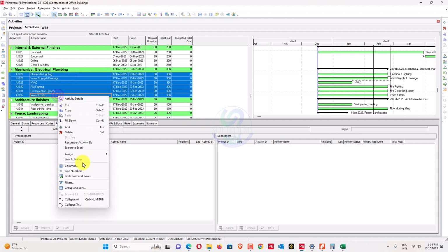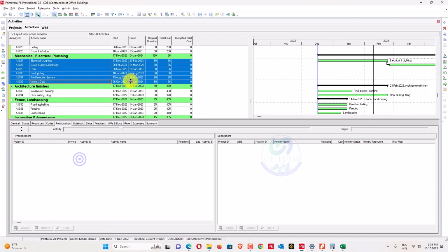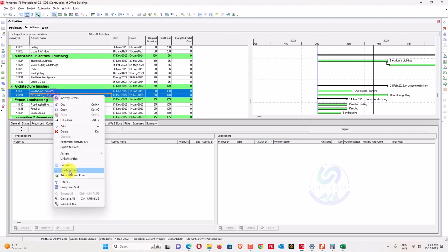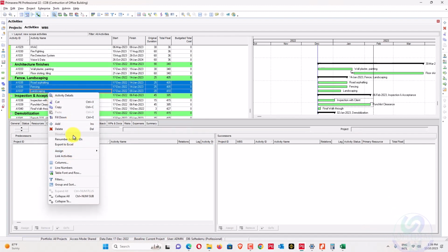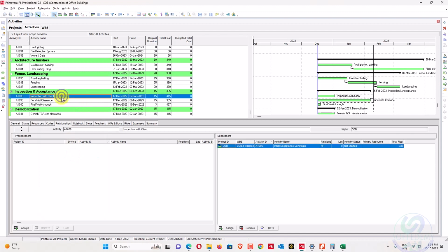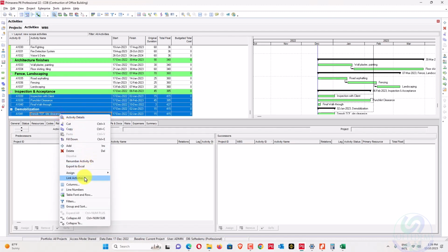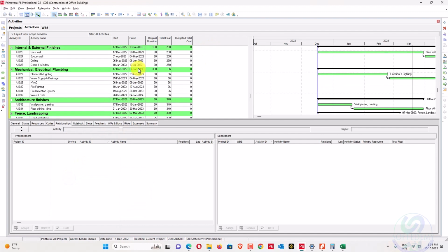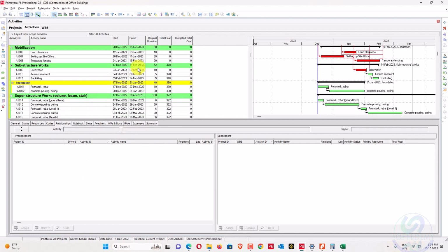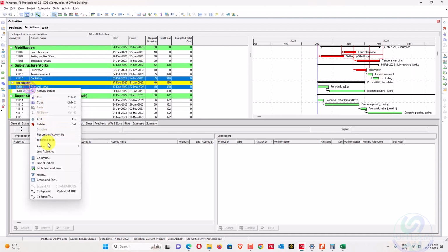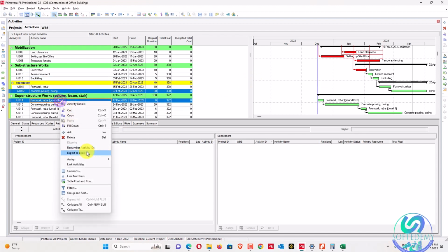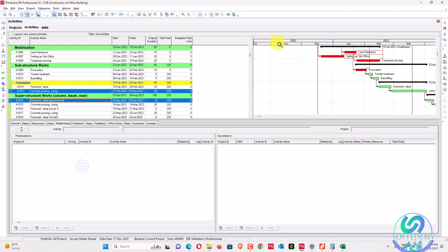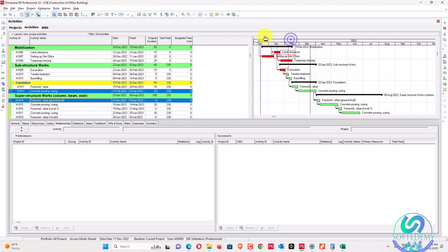Okay, we'll just link this one, and the next one link this one, then link this one, and the last one link all of this. Okay, we have linked all that. So after backfilling we have to perform the formwork. So we'll link this one now, and after that concrete, because it's foundation, we'll do it for the ground floor. When we link this one, you can see here it's just going upward.